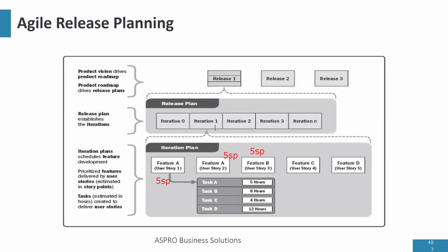It means that if we're doing work in other sprints, we should be targeting work of 25 story points per sprint. That is how it's used, so that we can know whether our team is underperforming or doing more than what we expect. So the story points let you know the capacity of your team per time.